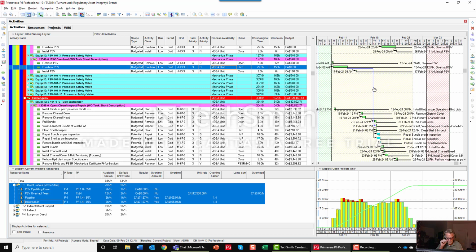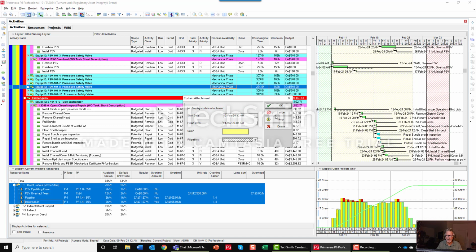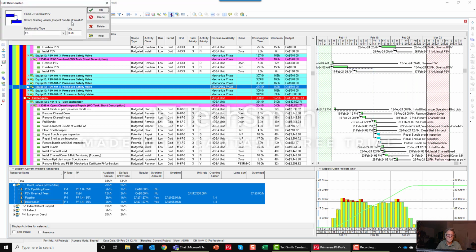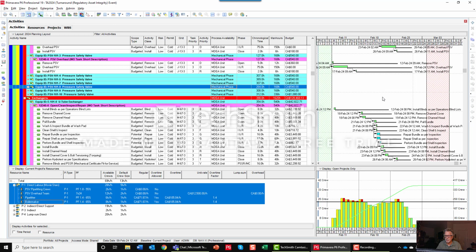I put a bit of a paper out yesterday on some of these different terminologies and techniques. I'm trying to minimize the number of relationships. Why am I doing that? Because these projects are so dynamic that we know that sometimes things are going to change. And what we want to be able to do is go in and reprioritize it.